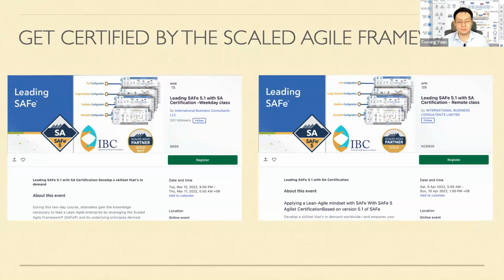So let's say maybe 8 people are working, and the past story point is 30. So at any one point, normal times is 8%, for example, and 2% is down, take leave or fall ill. So there's only maybe 5% or 6%. So you look at the team at 85%. You want to maybe aim this sprint to complete 25 story points.